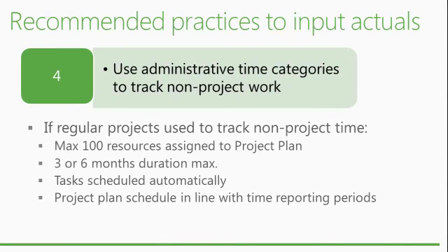All right, the next one is to use administrative time categories to track non-project work. This is the most flexible and easier way to deal with this. If it's not possible because you don't want to use a timesheet, that's another thing. In this case, you could use a regular project to track the non-project time, but you have to keep in mind some constraints there.